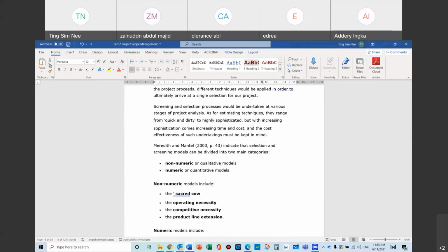And number one is the technical, that maybe some of the land conditions are not good. There may be topography that has a big valley somewhere that is going to be too expensive to carry out. And some of it is the ground conditions are technically just not feasible to carry out. And then there may be other issues related to authority. The authority may not allow you to do certain things, and therefore you have to not go ahead with the project. And this is the part where we are trying to see whether the project is actually yes or no.